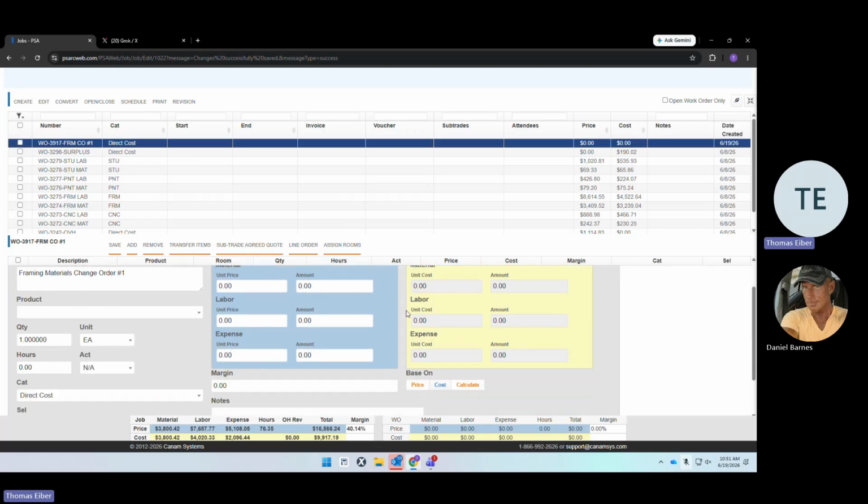So instead of doing that, every time we make an edit, like if we're doing surpluses or we're reassigning resources, the idea here as a PM is that you're never creating those resources from nothing. You're never deciding that you're just getting money to spend. That's not how it works, obviously. You have to borrow them from somewhere else. You have to reassign them.